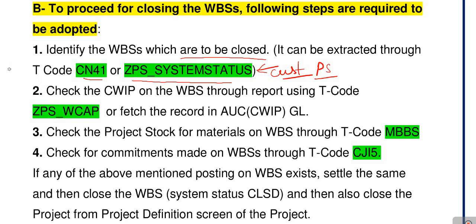check the status of all the WBS for which the status is not CLSD. The status is what? REL, CRTD, and TECO. All such WBSs are in open stages.